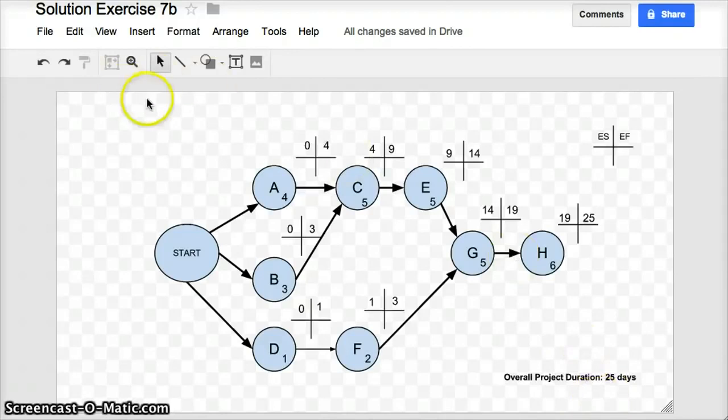I've mentioned a few times that all of these numbers that we've done for the early start and early finish quadrants of my crosshairs on all the different tasks, that it's the first pass going from left to right across my diagram. Now we're at a stage where we can do the second pass, which is backwards, right to left across the diagram. And before I do that, I need to fill in what the different quadrants at the bottom of my crosshair stand for.